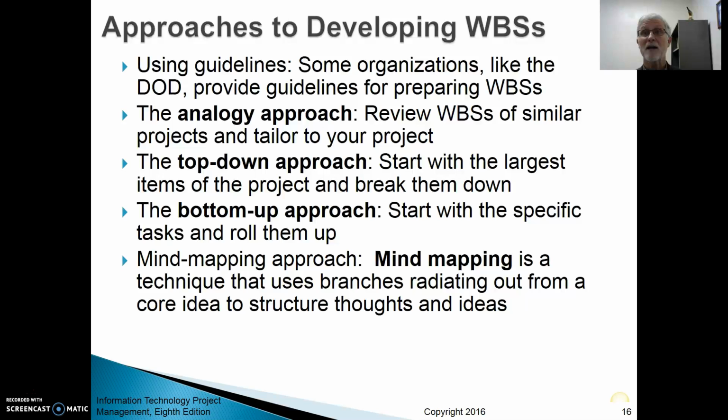Now, there are several different ways of developing a work breakdown structure. One is an analogy approach. You're doing something similar to something you've already done, and you can just tweak the project. A lot of projects, if you do a lot of them, especially if it's product delivery, you'll get a lot of those similarities. Sometimes it's a totally new one, and I may start top down and say, I have to start with the biggest item in the project and break it down into smaller and smaller pieces, going through that decomposition process. Or the bottom up approach is I talk to all the experts and say, okay, you guys are the ones doing the work. What's involved? And then just roll those up. So that's top down, bottom up.